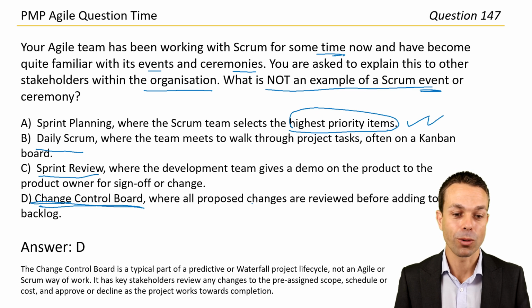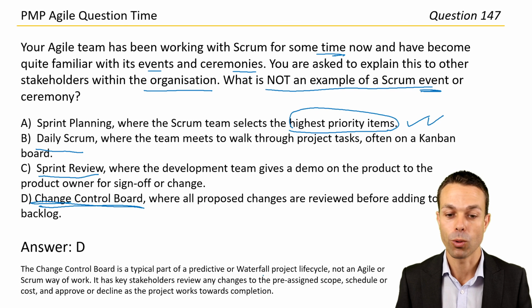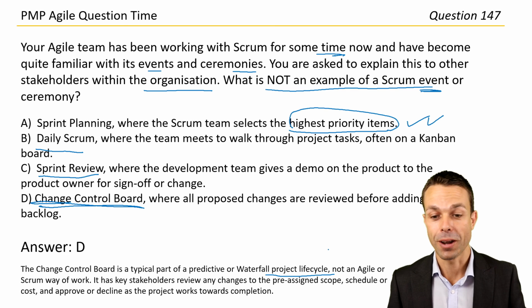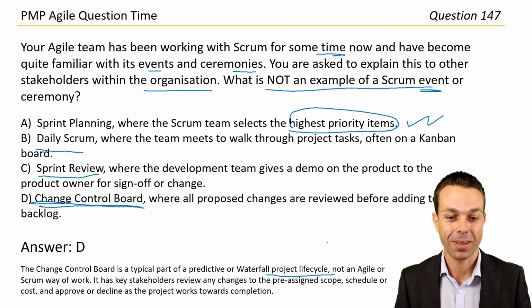The change control board is a typical part of a predictive or waterfall project lifecycle, not an Agile or Scrum way of work. And there we go.